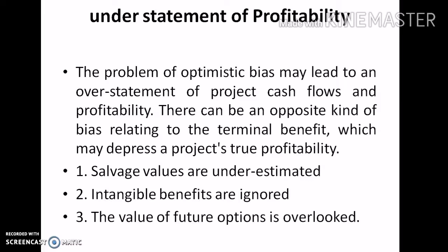For example, in real life situations, the net salvage value of a fixed asset has a very substantial market value to the project, but this salvage value is underestimated, and even sometimes ignored in the calculation of profitability. That may be due to some reasons, like the rate of physical wear and tear is usually much less than the rate of depreciation for tax or accounting purposes, or maybe due to the secular rate of inflation in India being around 6% or something like that, and we always underestimate the salvage value.